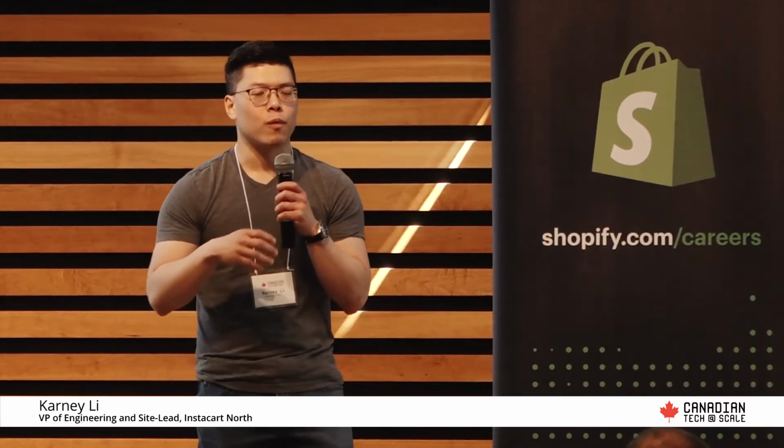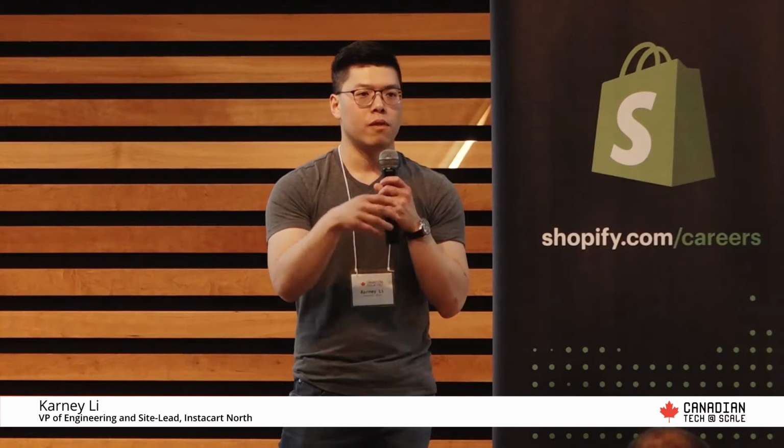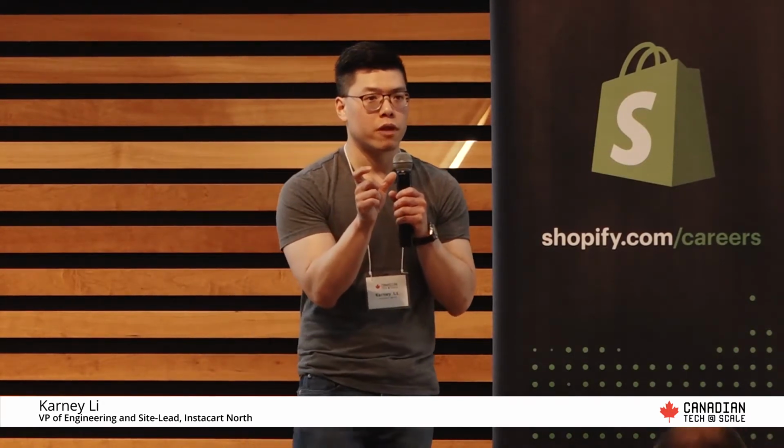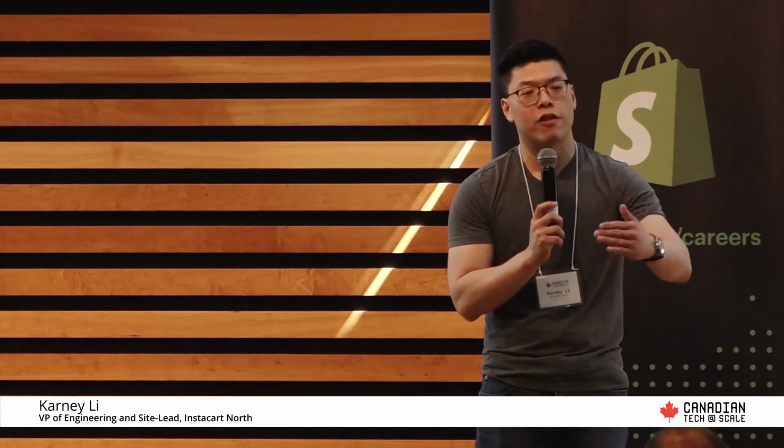So what is the purpose of Scrum or Kanban or any of these processes, these methodologies that we build up in the world of Agile? And the purpose is to limit the amount of work, right? By limiting the amount of work that we're doing, we increase the frequency in which we will get something to production, right? So then you can break down the process and understand why is it different, right? How are these two things different? So they both try to do the same thing, right? Like they're both trying to get software to production sooner.